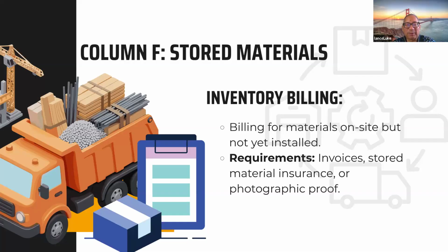So the requirements are for invoices, stored material insurance, or some kind of photographic proof of the material. So it's better for me as a construction manager inspector to see materials actually on the job site.